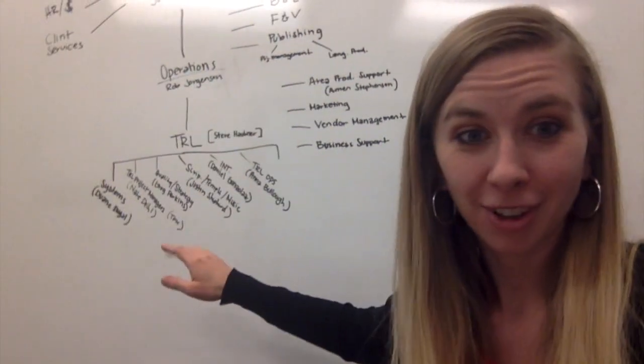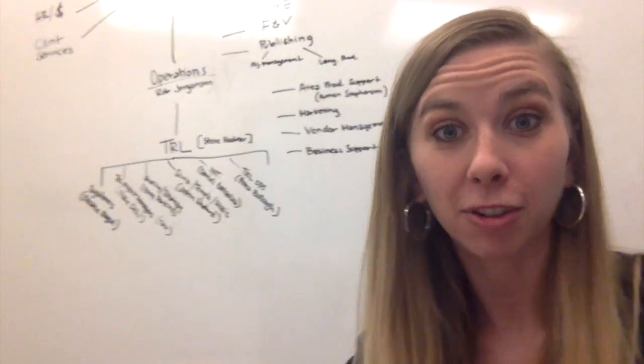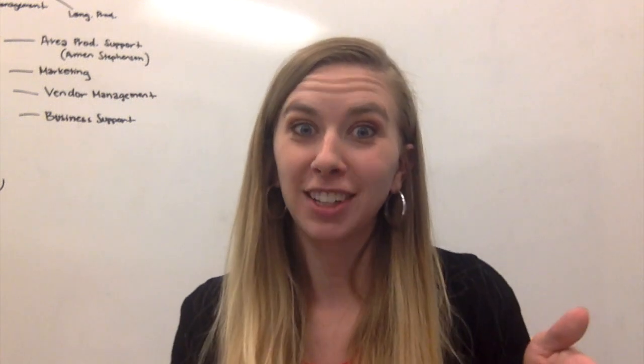that our translation project managers, these individuals that get all of our project requests, set up the expectations, help define the scope for the project, and also commit to budget and schedule on your behalf, use a tool to estimate how long a project will take, and the tool itself was built as though you could complete 6 TGP a day, not just translation, but 6 TGP from Enter Language Office all the way through supervisor check a day, for any given project, right? And maybe if you have all individuals in your office working on a project, that's great. You could get through 6 TGP a day.